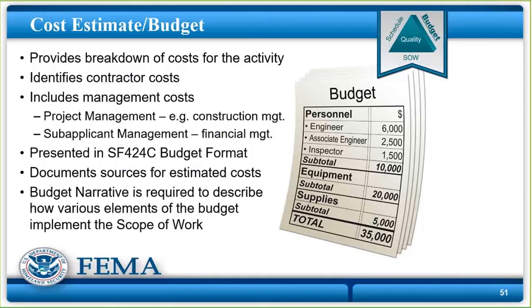We're not going to hold you to what we think it's going to cost. If you think it's going to cost $5,247 to do project management for this grant, and in reality it went a heck of a lot easier and only cost $3,000, and you wanted to use those other $2,500 or so toward site improvements that were green infrastructure, we'd let you do it as long as those site improvements were included in the original scope of work and were reviewed through the environmental review process.